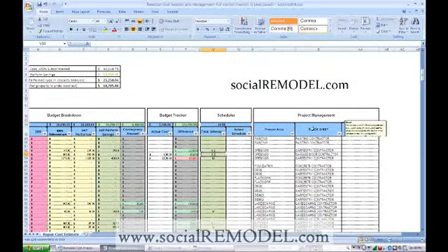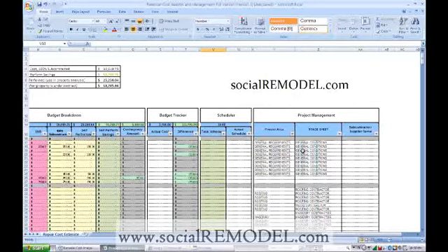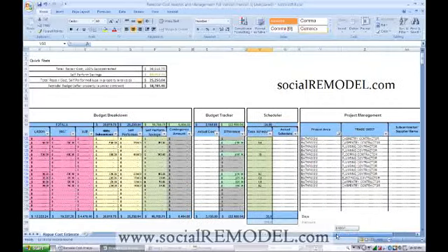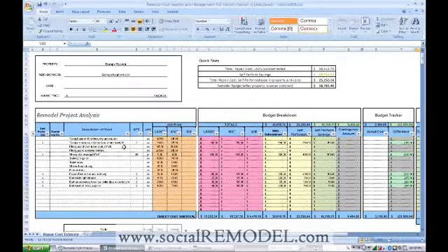Project management is another very valuable tool for analyzing scopes of work. Basically, in this project area, you can analyze areas of the remodel. So if you want to analyze just the bathroom portion of your remodel, you can go in, select bathroom, and as you can see, it selected all the bathroom work items there. So you have your vanity counters, your vanity cabinets, your toilets, your pedestal sinks, and your faucets, and it'll show you what your quantity is, and you can go in and see how much your budget is.